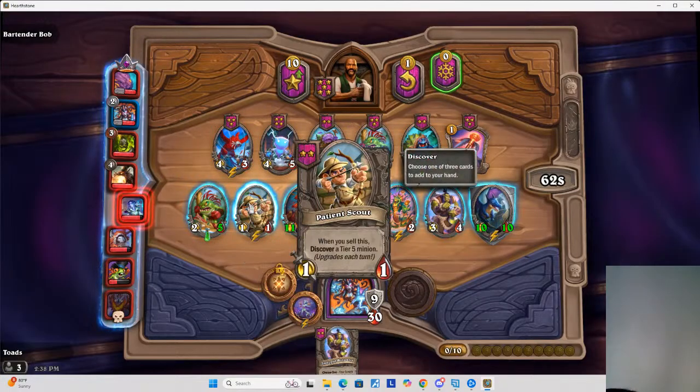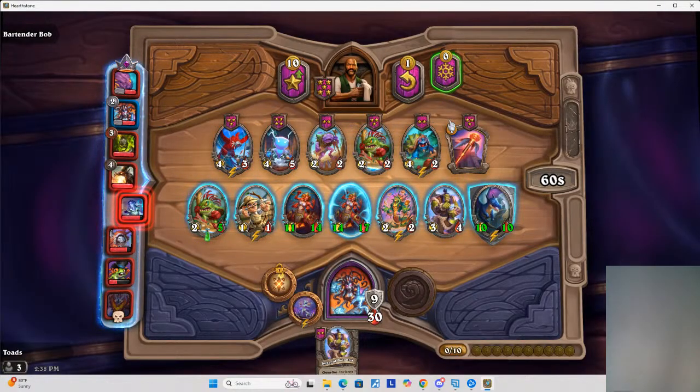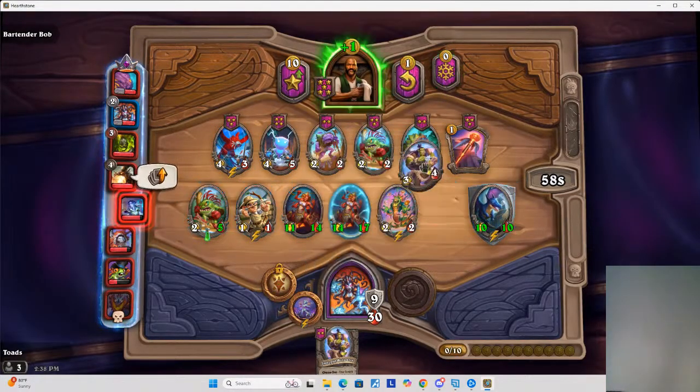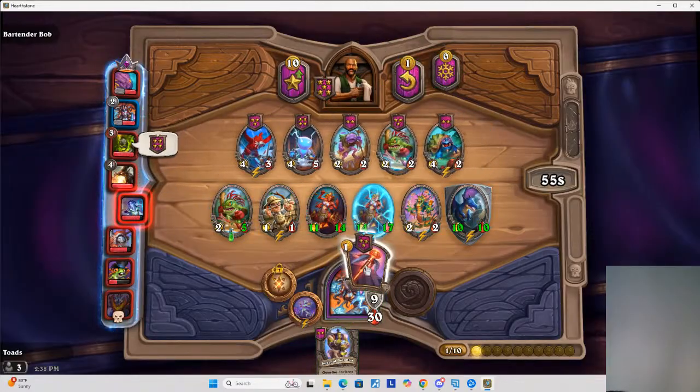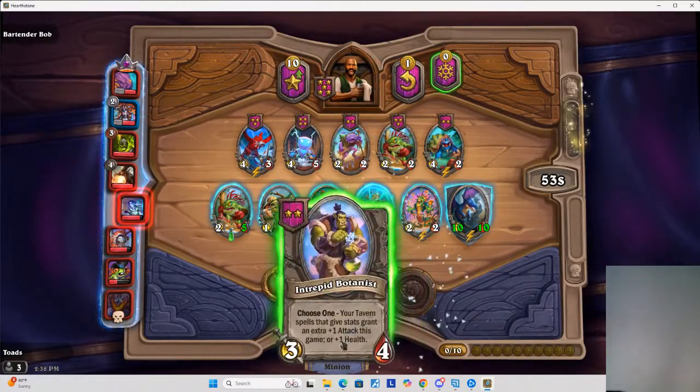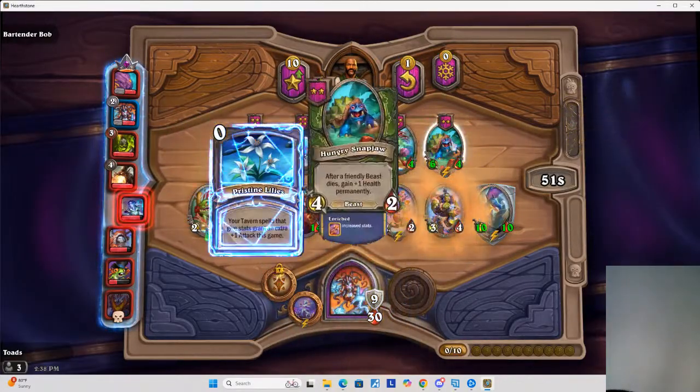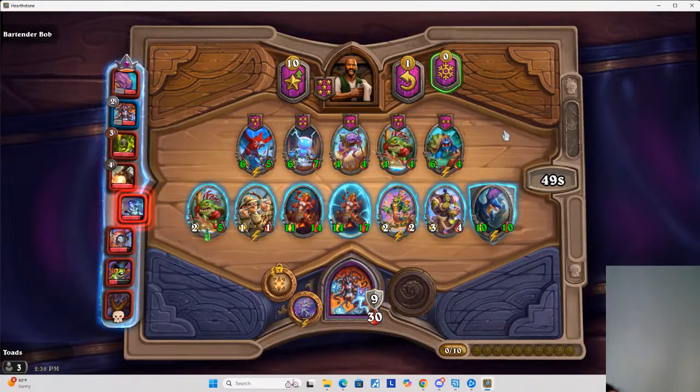Maybe $30,000 is the line of credit she got. On the other hand, she might say that a business owner she knows just did the same thing for $30,000. Another way to uncover the crucial factor is with what-if scenarios. For example, what if we can't finish the work by May?